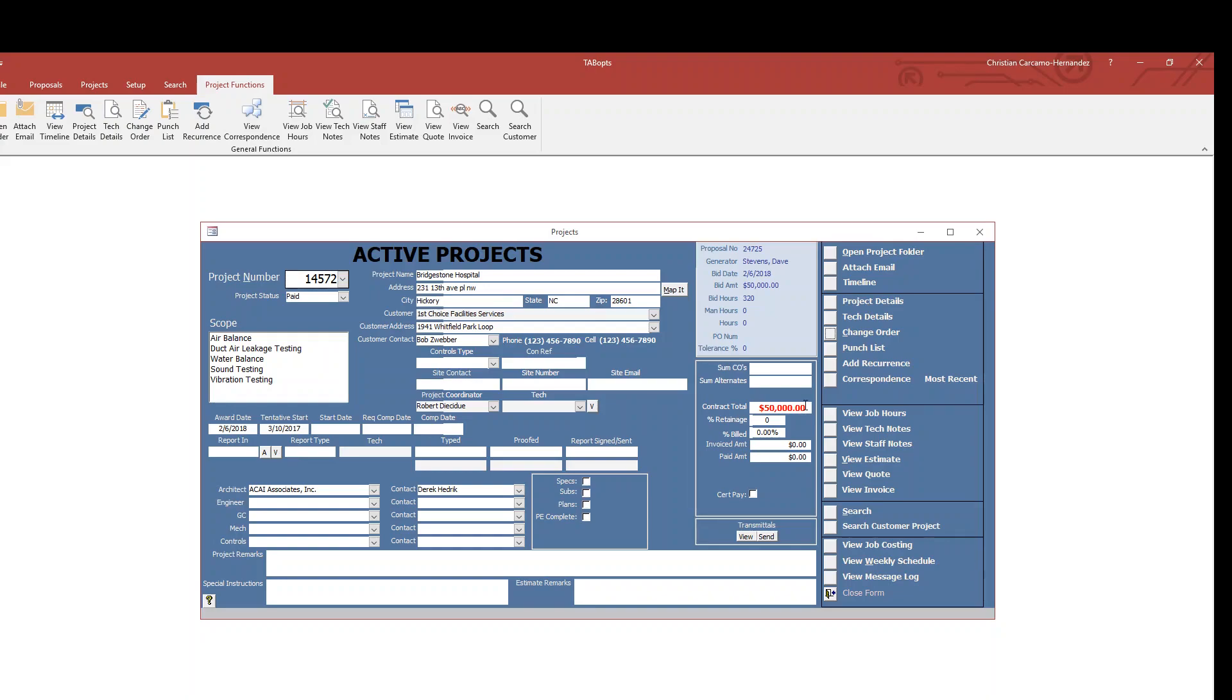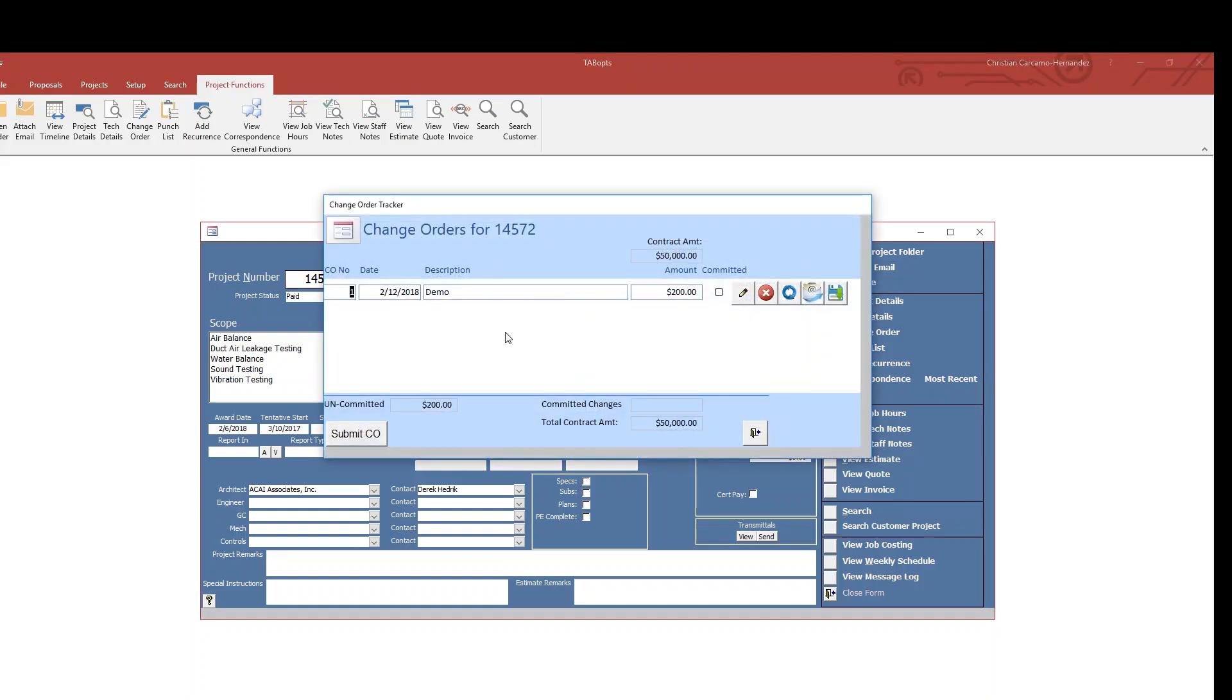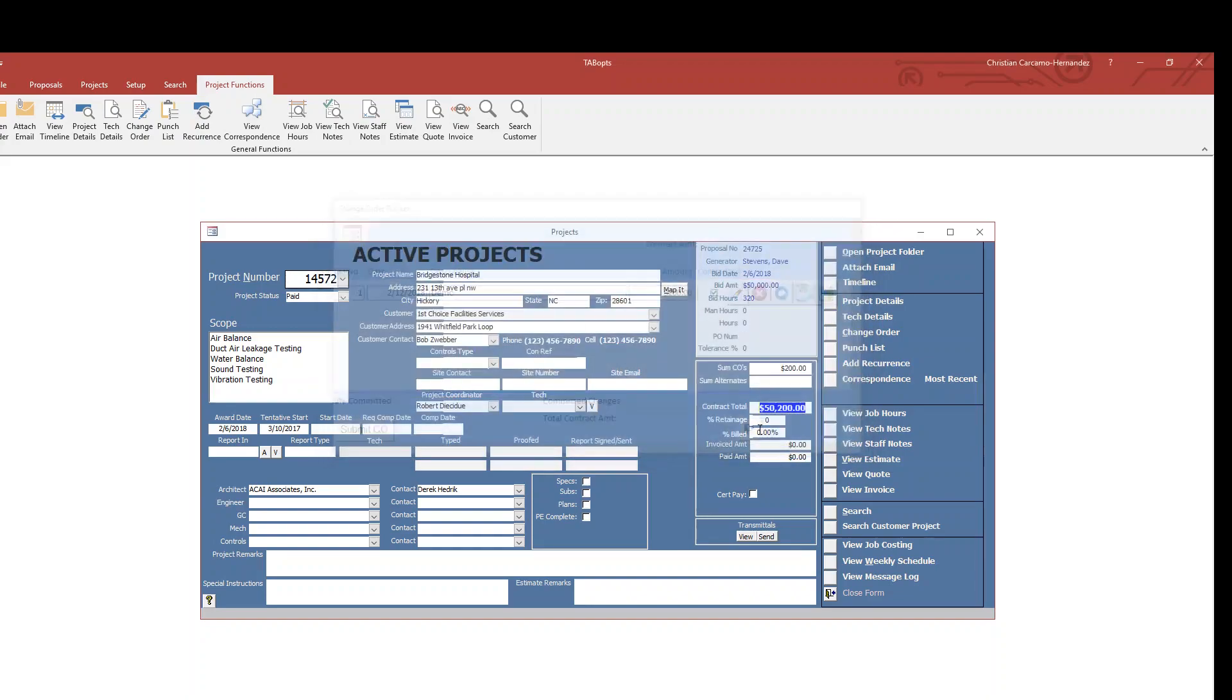In order to approve these change orders, you'll simply double-click on the price there, come up here, and to submit the change order hit this button here, and simply close that out.